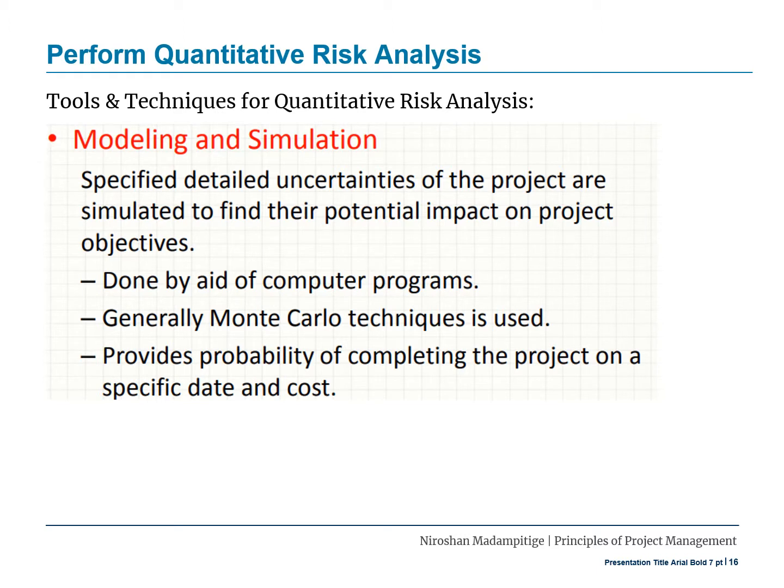Modeling and simulation. Specific detailed uncertainties of the project are simulated to find their potential impact on project objectives. Done with the aid of computer programs. Generally, the Monte Carlo technique is used here. It provides the probability of completing the project on a specific date and cost.